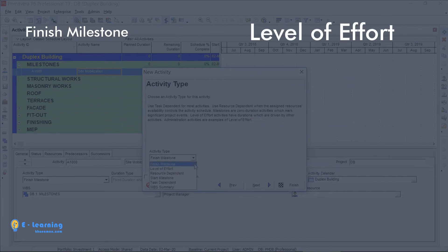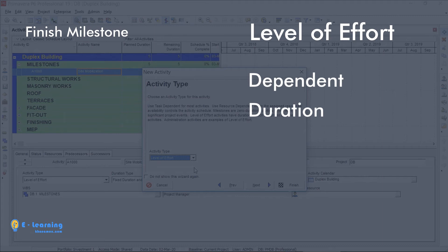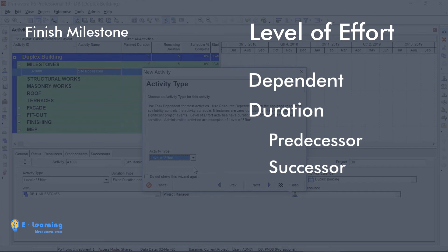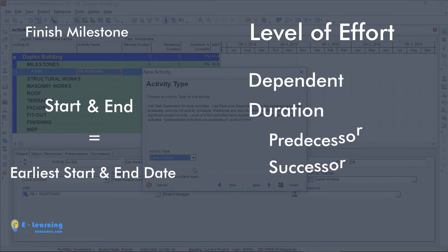The next one is Level of Effort. This type is not independent in nature. The duration of Level of Effort depends on its predecessor and successor activity. Start and end date of this type is equal to the earliest start and end date of its predecessor and successor activity.